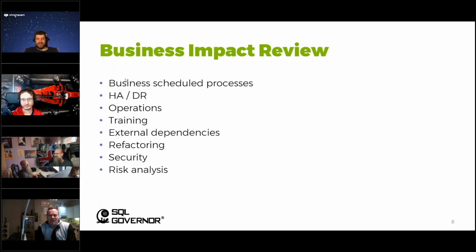The migration process, thoroughly from the very beginning to the end, may last in bigger companies many years, many times, and risk analysis is very good to implement in the very beginning, because it answers questions like which are the risks of the project, and then on the other hand, what are the business impacts if it's going to happen, and then how to mitigate those risks.